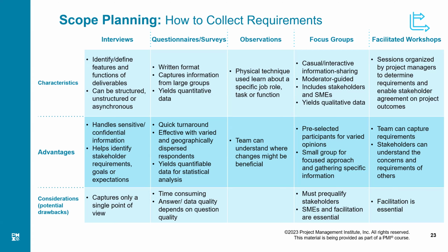But here the advantage is we are interactive. We are discussing, we are talking. So interactive information sharing is there. And you, the interviewer, are the information gatherer. You are the moderator. You are moderating the discussion. You are trying to divert the discussion in the right direction if it gets out of hand. And it includes all the important stakeholders and subject matter experts who must be in this small group who hold the data.